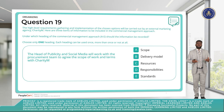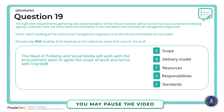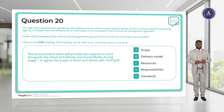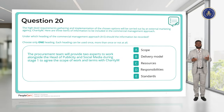Question 19. The head of publicity and social media will work with the procurement team to agree the scope of work and terms with Charity M. These are responsibilities that they hold, so the answer is Responsibility — heading D. Question 20. The procurement team will provide two experts to work alongside the head of publicity and social media during stage 1 to agree the scope of work and terms with Charity M. These are the resources we have, so this will be written under Resources — heading C.